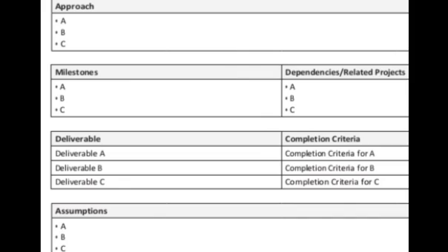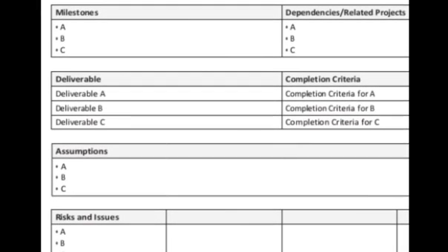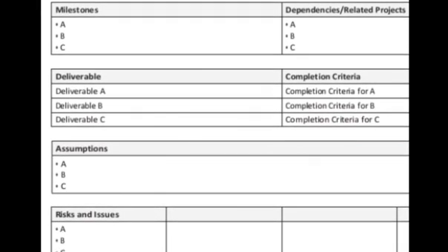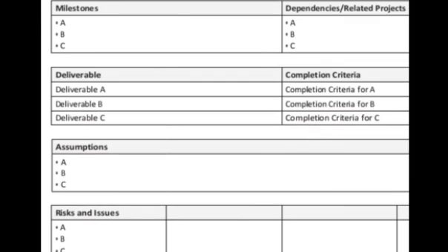Now, the completion criteria for that project is that the foundation must have been done to the DPC level in 1 week. So when the project manager or the project sponsor comes for supervision, what they want to see in that 1 week is that you have completed the foundation to the DPC level. You understand? So when they come, that's what they want to see. Anything other than that means you've not met the completion criteria. You understand? So that's what the completion criteria is talking about.